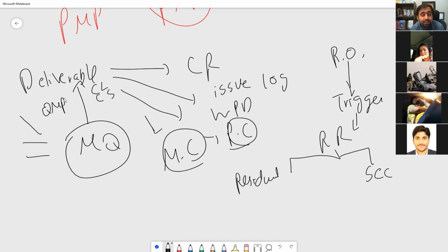While we are producing deliverables, maybe we need to buy something. We have already made our procurement management plan and procurement statement of work. We give it to the bidders, and we hold the bidder conference here in execution. Once the bidder conference is held, everyone gives their seller proposal. We negotiate with the sellers, and once we have negotiated, we finalize the agreement.